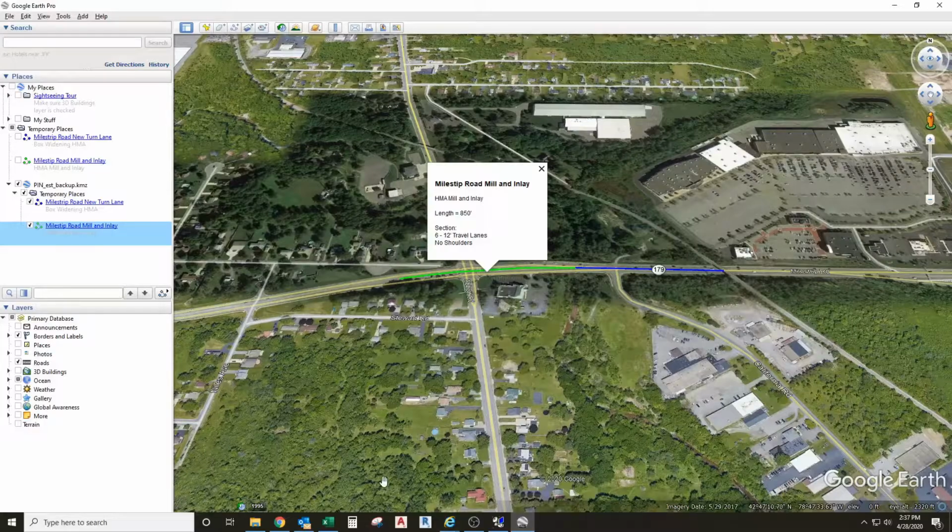And this is really useful for somebody picking this up at a later date from when the estimate was done. It just makes it so much easier to go and review what somebody was thinking in the earlier stages. So it's pretty good practice to keep a KMZ file with your estimate, especially if you don't have a CAD drawing yet. If you're at the stage where you have this drawn in CAD, this might not be necessary, but I think it's a really good idea if you don't have that to add this KMZ.